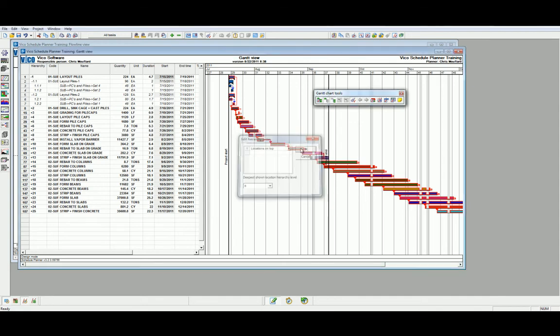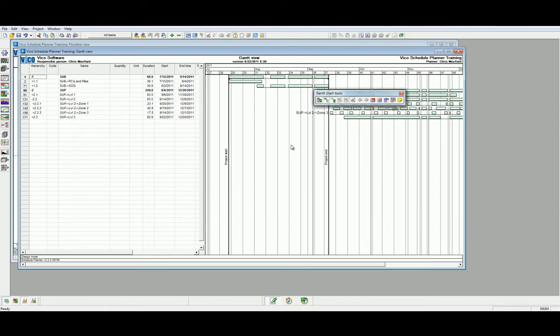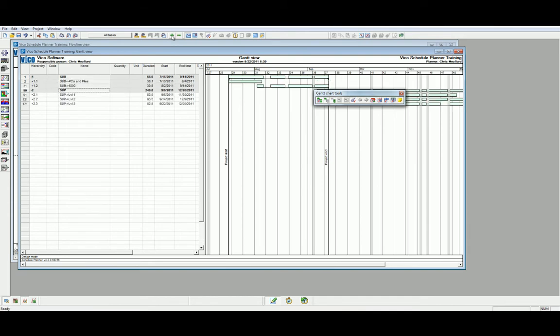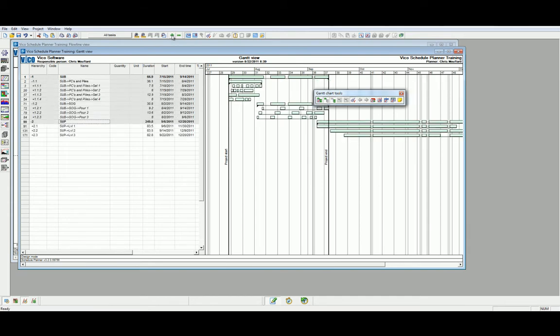Let's click OK to check this out. As you can see, we have split this out into both the Substructure and Superstructure Location Systems. Let's highlight both of these Location Systems and use the plus arrow to open up the different task parts that exist within them.